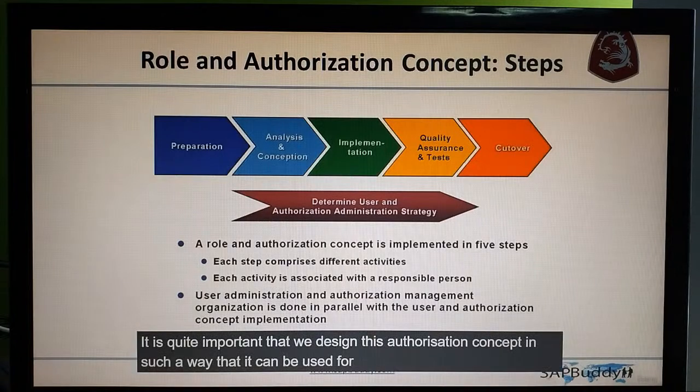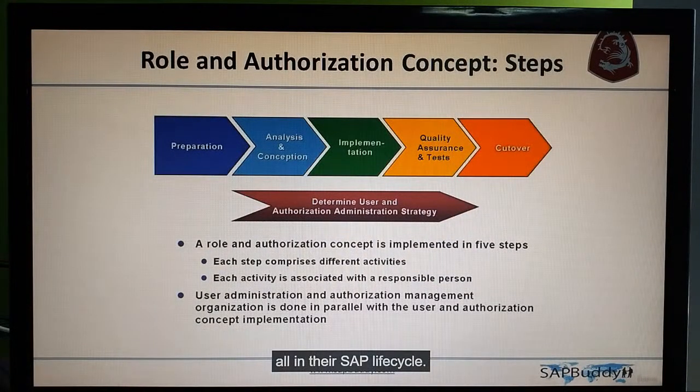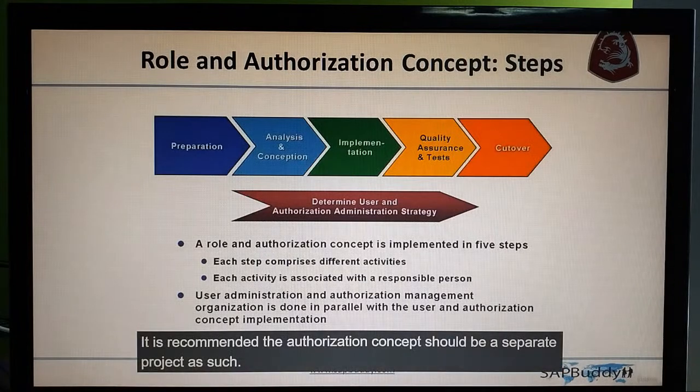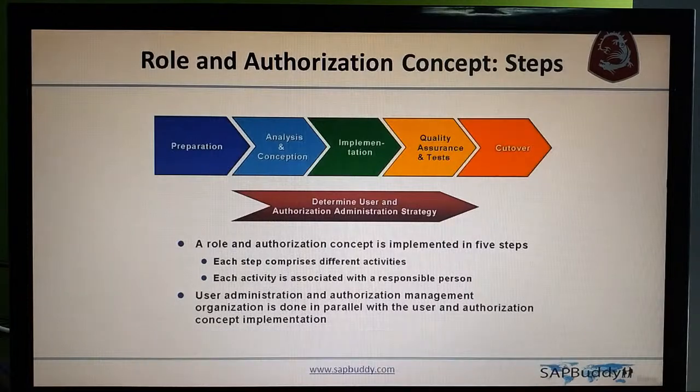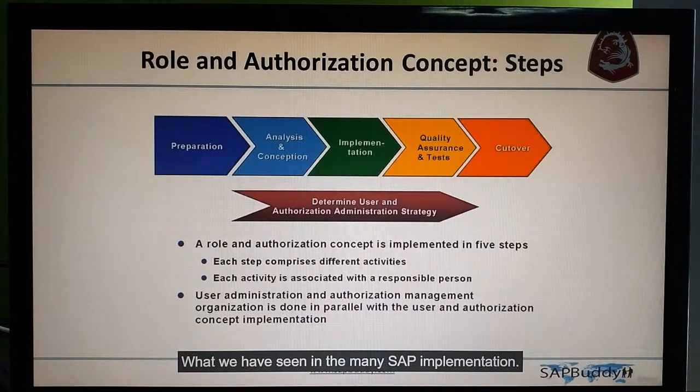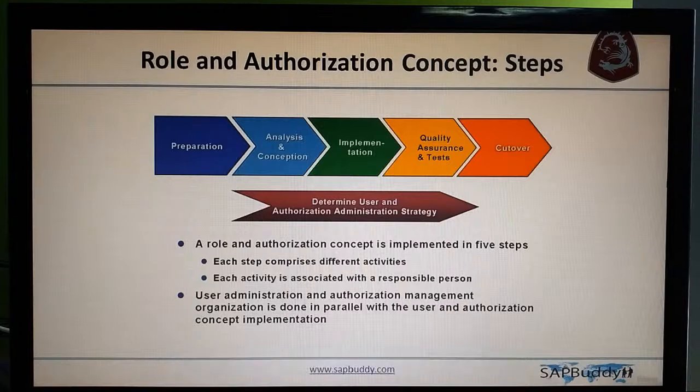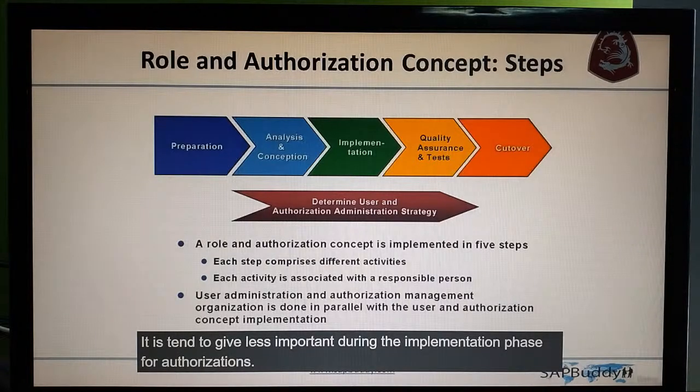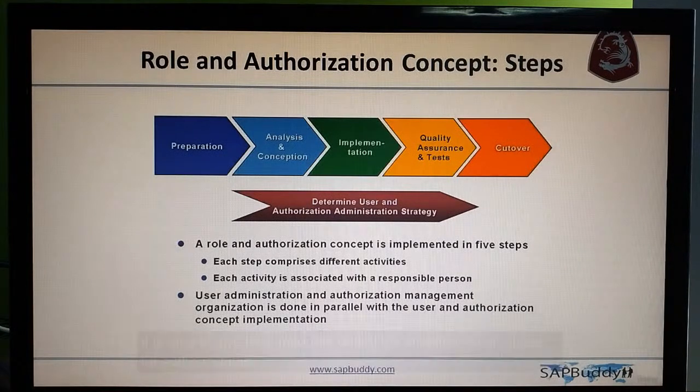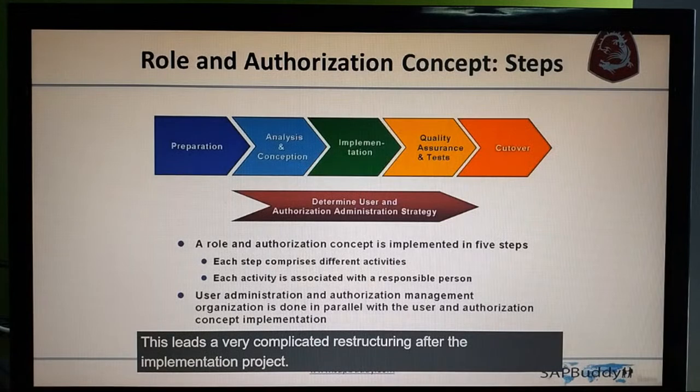It is quite important that we design this authorization concept in such a way that it can be used for the whole SAP lifecycle. It is recommended that the authorization concept be a separate project as such. What we have seen in many SAP implementations is that authorizations tend to be given less importance during the implementation phase. This leads to a very complicated restructuring after the implementation project.